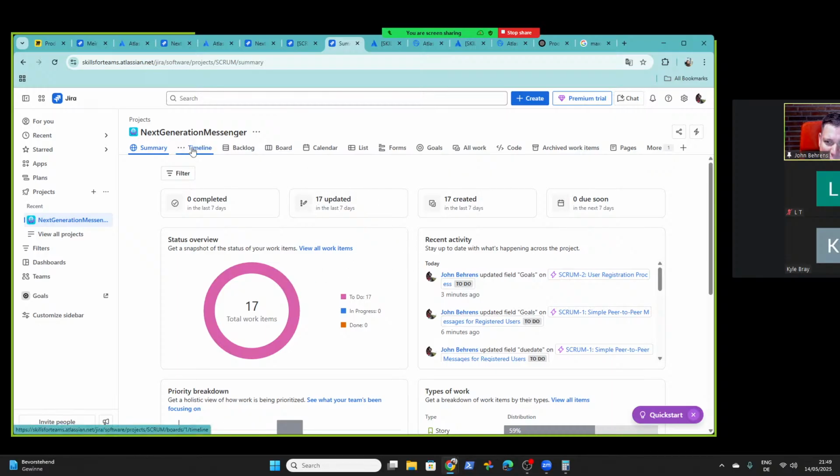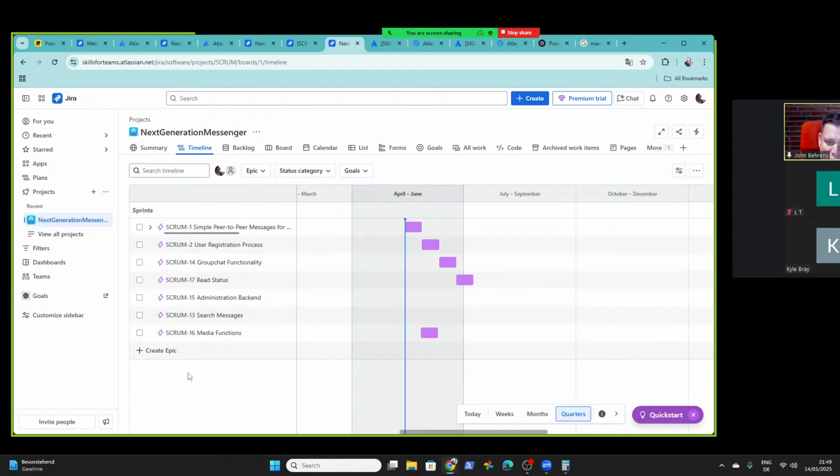But we also tried the timeline feature, which is new in Jira and is more like a Gantt chart. We did not search for the dependencies, but we can do it. You can plan your epics here in a project way, when they're starting, when they're finishing. I've seen some people doing it. From the perspective of a Scrum Master, an Agile coach, it tends to be a bit like the Gantt chart way, and I prefer the product roadmap plans, which cover KPIs and goals.